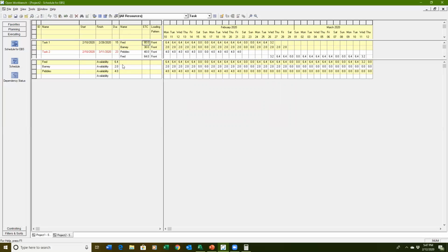I can set up a view where I can modify this resource availability week over week, and I can key in the resource availability week over week and modify it. So I can say Fred's available for 6.4 for these 3 weeks, and then 50% those, and that would modify how this would get spread, because this spread is sensitive to the availability. This particular entry assumes that Fred's available for whatever the length of the project is going to be at 6.4 hours. We can get into why 6.4 versus others.